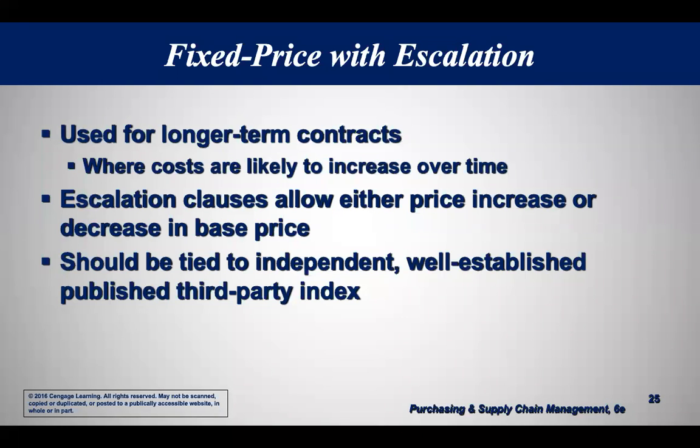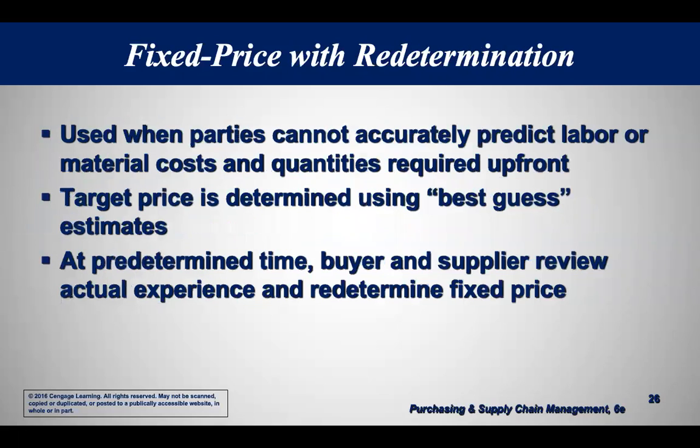So you could say, okay, I'll pay you $500 for this desk in the first year. In the second year, the price will be $500 adjusted according to the Consumer Price Index from Stats Canada. So then there's no debate, right? It's not your opinion. It's not my opinion. We'll actually increase the price based on a third-party index. Same thing as for termination. We talked about these. I've forgotten this information was in detail here.